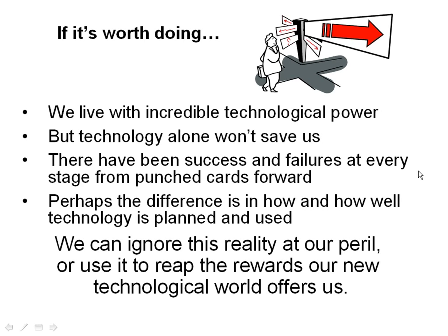One of the things that I would certainly suggest that you avoid is allowing anyone, technical people, the operational people, or executive management, to give you an arbitrary number and say you must do this by X date. They may be right, but in about 90% of the cases, that's going to be somewhat short of what it'll take to actually do it. And if you get into a position where you're facing that, and that gets set in stone, then what you'll end up doing is missing that date and having to come up with another date. You maybe miss that date, and every time you miss a date, you lose productivity in the project.